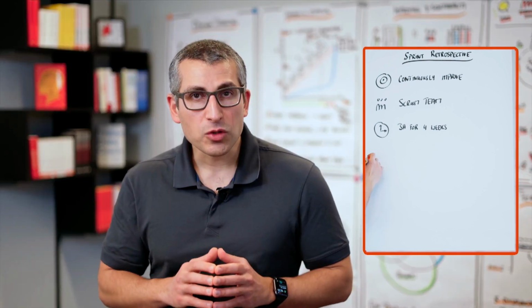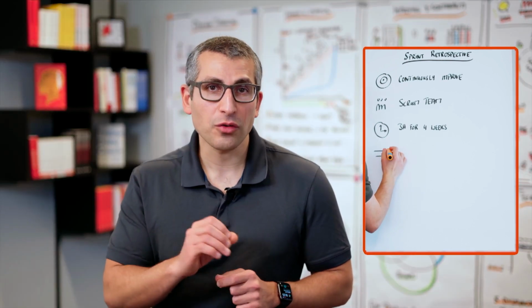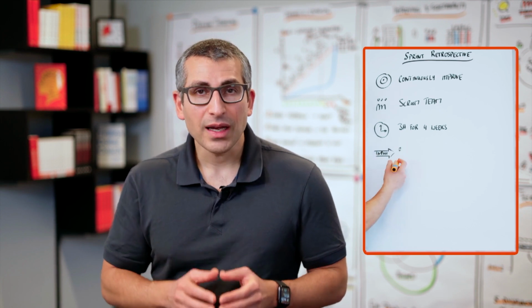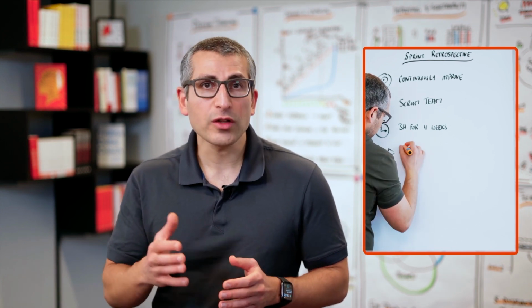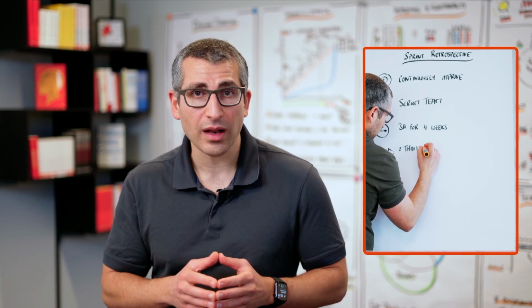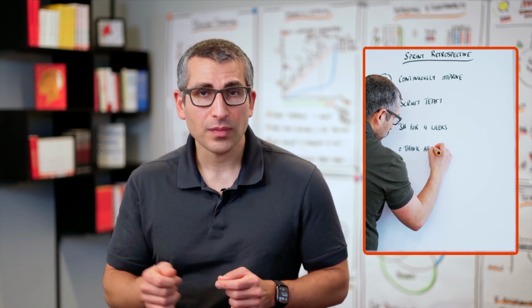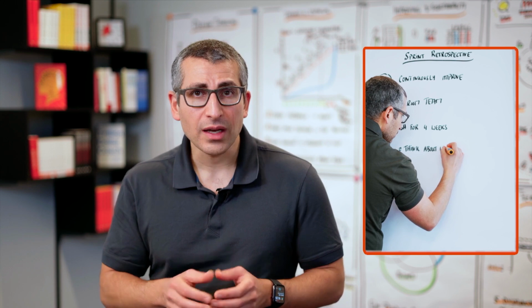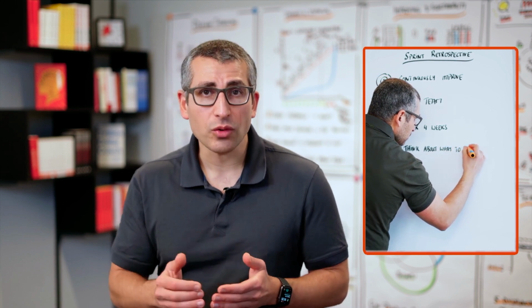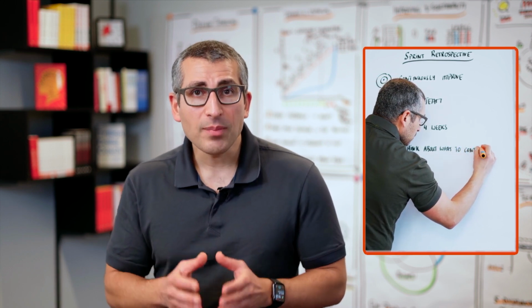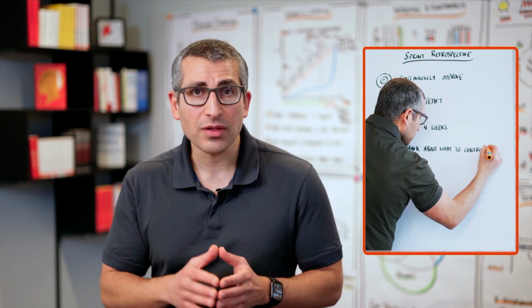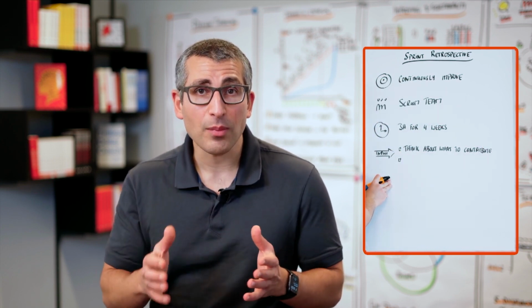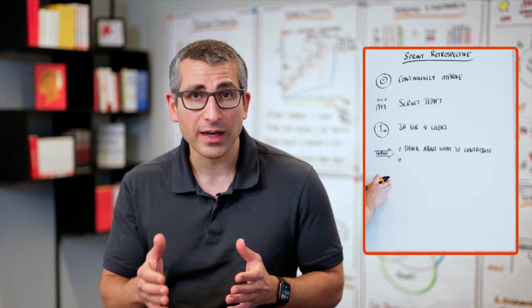As preparation for the Sprint Retrospective, we need to cover 2 things. First, what every single participant does, and that is thinking about what went well and what didn't go so well in our past sprint. If your sprint is longer, for example 3 or 4 weeks, I recommend people to take notes throughout the sprint. And maybe you as a Scrum Master can give them a board where they can put up the notes so that they don't forget about them when they enter the Sprint Retrospective itself.